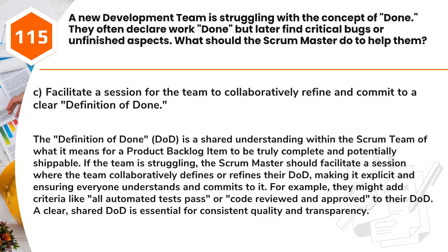For example, they might add criteria like all automated tests pass or code reviewed and approved to their DoD. A clear, shared DoD is essential for consistent quality and transparency.